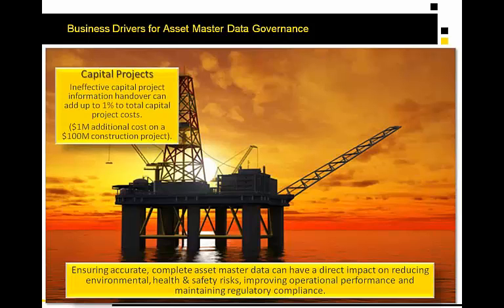The particular business cases that we engage are the ones you're familiar with. Capital projects are a situation where there's enormous change in assets or addition of assets to your infrastructure. Capital project information handover handled improperly can add up to 1% of the total capital project cost.